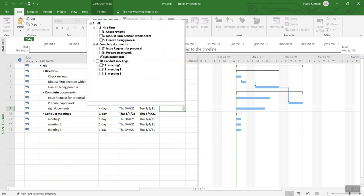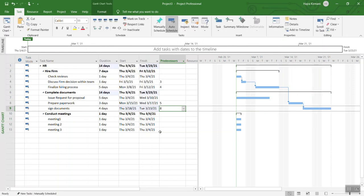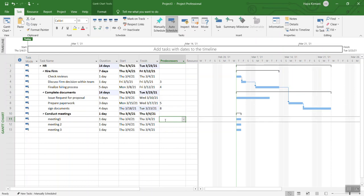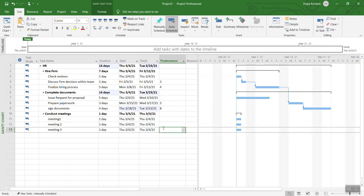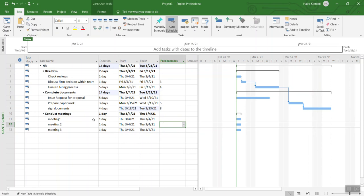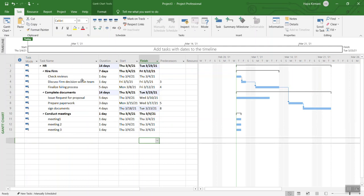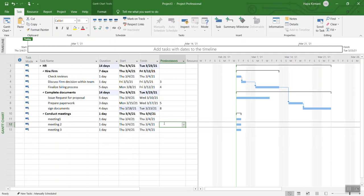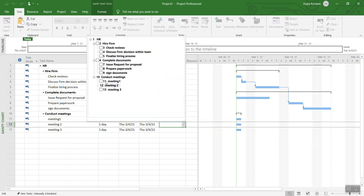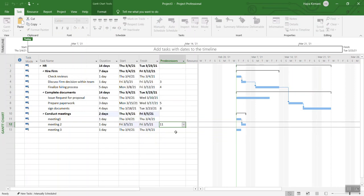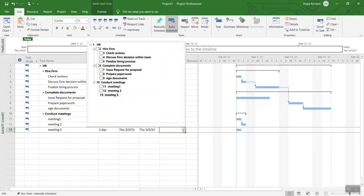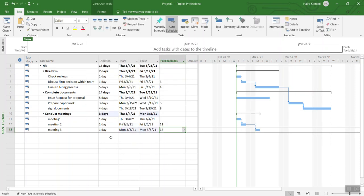Similarly, for the meetings, you can identify the dependency between one meeting, two meeting, three. Maybe they do not have any dependencies. These meetings may be able to run in parallel. This is just an example, so you got the idea of how that's working. Or we can say that meeting two cannot happen before meeting one, and then we just make it a dependency. Then meeting three cannot happen before meeting two happens, and then we make it a dependency.